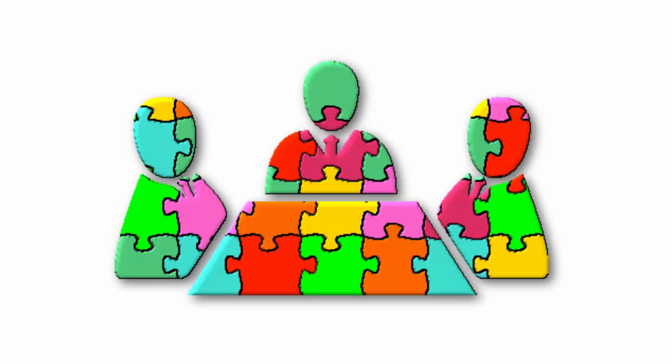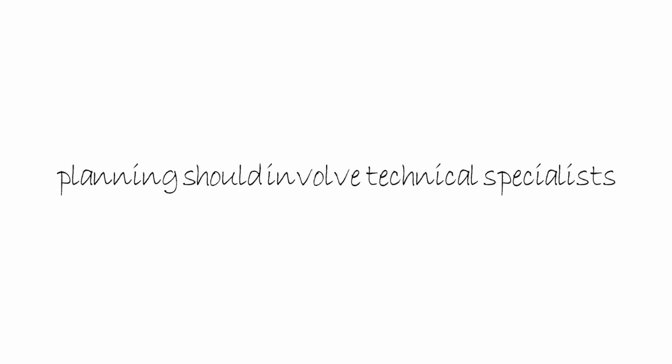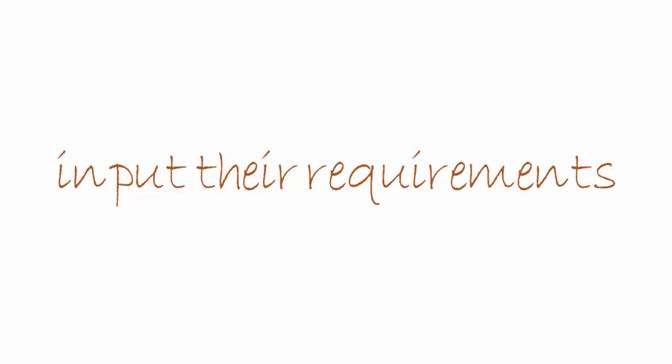For example, in our food preparation example, the cooking of the meat could not begin until the marinating was complete. In a technical or complex project, planning should involve technical specialists who will understand the process and be able to input their requirements at this stage.